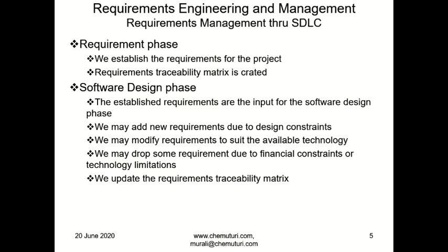At least in these four phases, we have to manage the requirements. Okay, if it is a single web page, we need not manage. But if it is a product, we need to manage. In the requirements phase, we establish the requirements for the project. We may do elicitation, we may do gathering, and we may analyze them, and then we may document them, we get them peer reviewed, and at the end get it approved and establish the requirement. This is what is done.